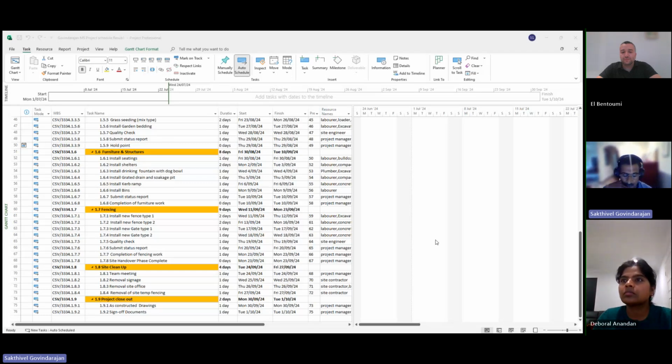First, identifying the concrete material. The strength of the concrete should be 15 megapascal, and the curing time is about 3 to 4 hours. I carefully took this into consideration when I did the project schedule, making sure other activities don't interfere with these activities. This gives the time frame in the schedule to allow curing, and other activities are stopped to prevent interference.